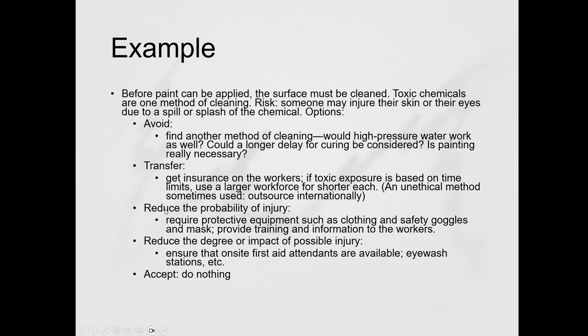So in this, we're taking on the risk ourselves, and we're going to try to alleviate some of that risk to the people by making them wear PPE. Others reduce the degree of impact of possible injury, so ensure that on-site first aid and attendants are available, eye wash stations, etc. So as we're thinking through these risks, we're trying to reduce that harm to the individual.